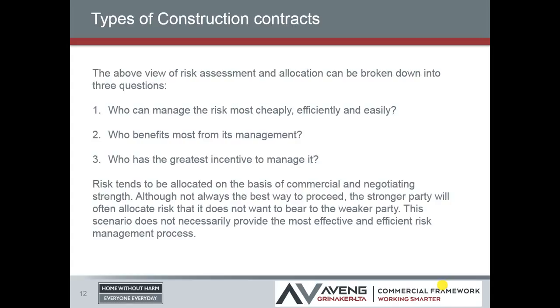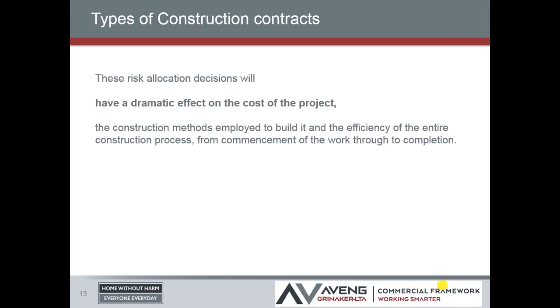Price inflation. It may be better to give that risk to the contractor, but he's going to price in a serious premium because it's an unknown risk. But as an employer, you might want to have absolute certainty of cost from a financing point of view. So these are decisions that are really delicately balanced between whether they get transferred to the contractor or the employer. But the bottom line is, if they've been transferred to you as a contractor, you need to understand and you need to manage those.